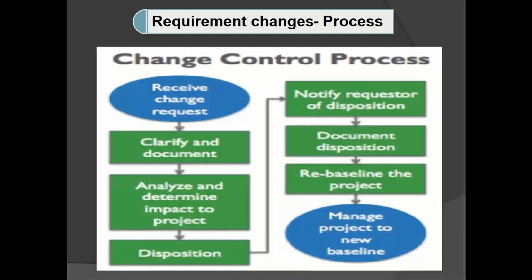Then the project manager is going to estimate and say a figure, saying that, okay, I require 20 hours of time and 2 resources, for example. Then the project manager is going to add some buffer time and some buffer resources. So he will take it as 30 hours and 3 resources. And then he will estimate the price. For example, let us say per hour we are going to charge $80. So 80 into 30 becomes $2,400. 2,400 into two resources is $4,800. In this way he is going to give the price estimation to the client.